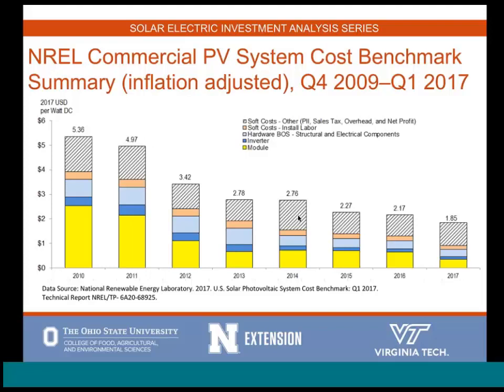Yeah, that's a great point, John, and one to expand on a little bit. That project I worked with here in Ohio, where we were at $1.86 a watt, was a statistical outlier, you'd say. It's the one farm I've seen that has hit that number, but it's ironic that it's one penny off of what the modeling shows. A more representative sample of the numbers I've seen here in Ohio is anywhere from $2 to $2.75 over the last year, which has been pretty common. But once again, some of that is going to be driven by size as well.